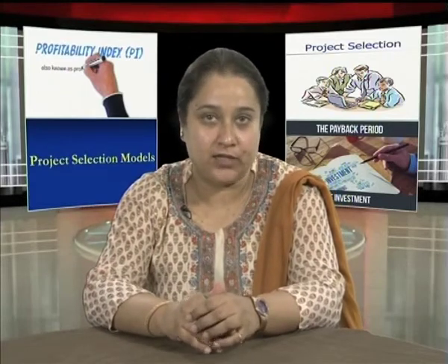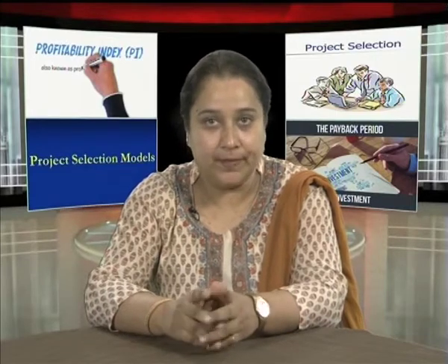It is also known as benefit cost ratio. The profitability index is the net present value of all future expected cash flows divided by the initial cash investment. Some firms do not discount the cash flows in making this calculation. If this ratio is greater than 1, the project may be accepted.